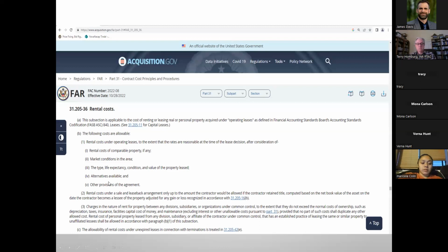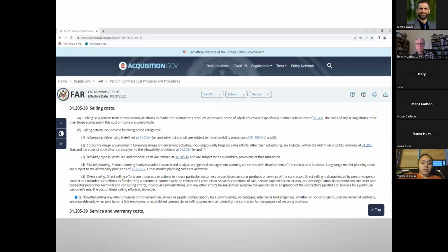So if you're doing, again, federal contracting, you're going to want to go through and read these. Selling costs, this will tell you again what's allowable and what's not allowable. Notwithstanding any of the provisions here, seller and agents compensation fees, commissions, percentages, retainer, brokerage fees, and other than are not contingent upon award of the contract are allowable only when paid to bona fide employees. So again, conditions under what and how you can charge those costs.